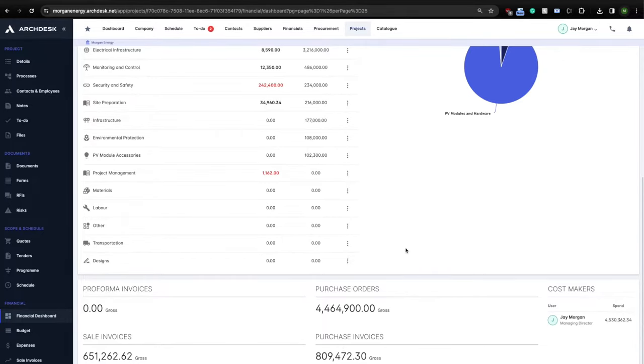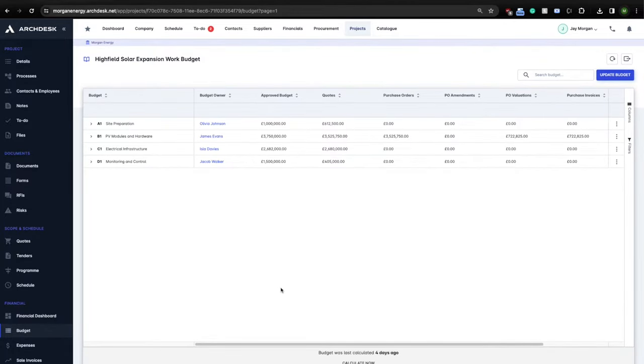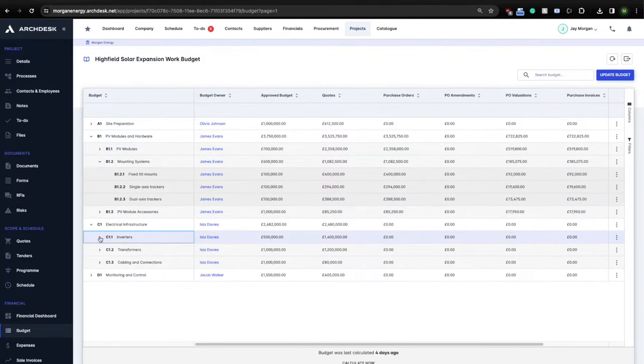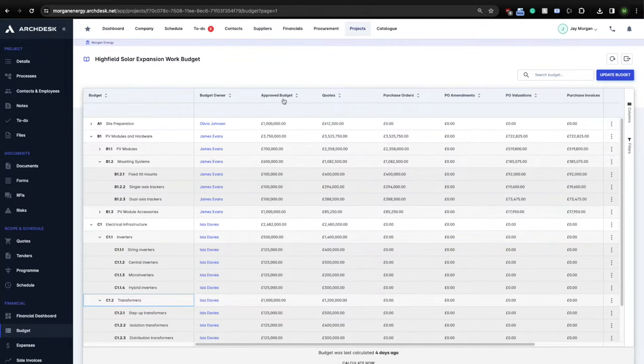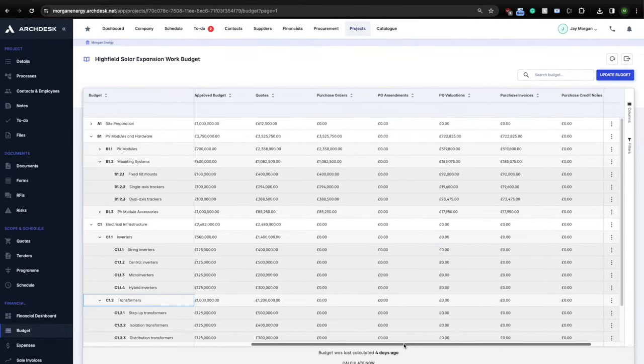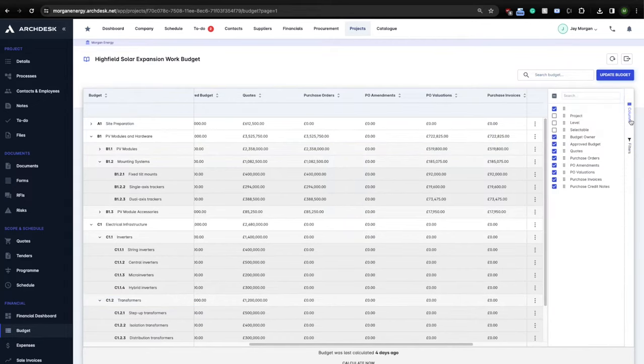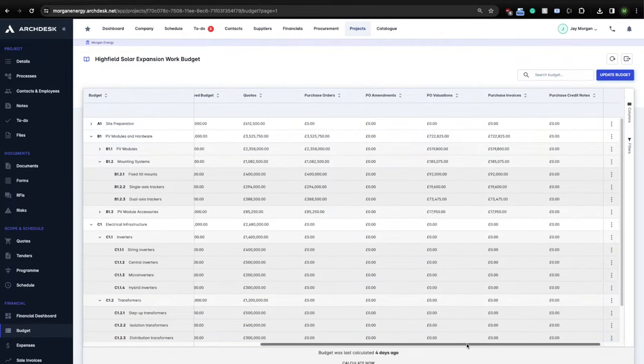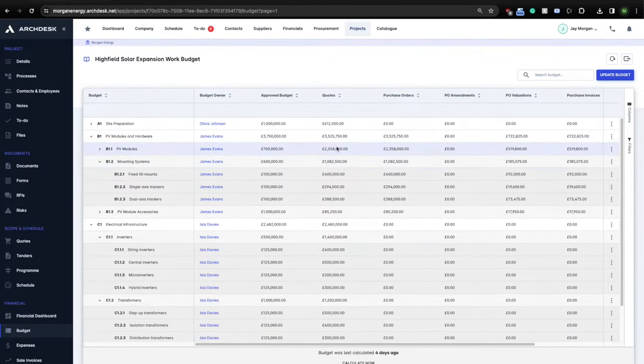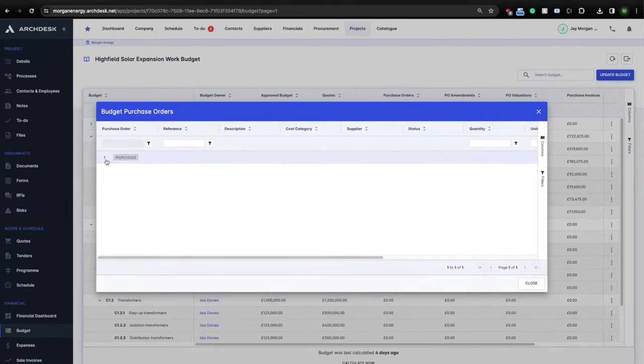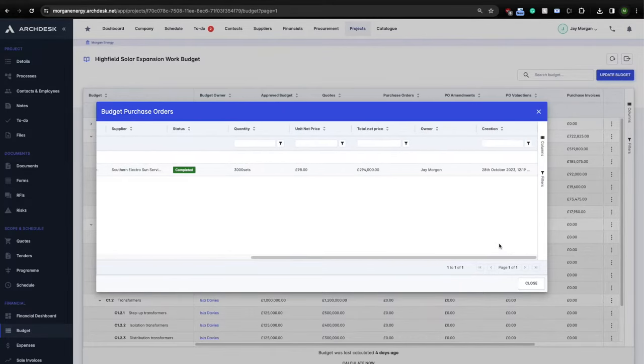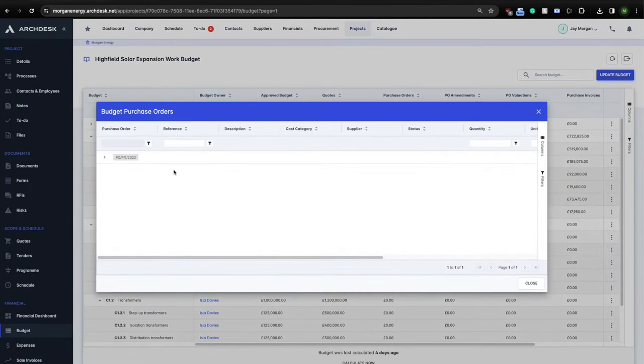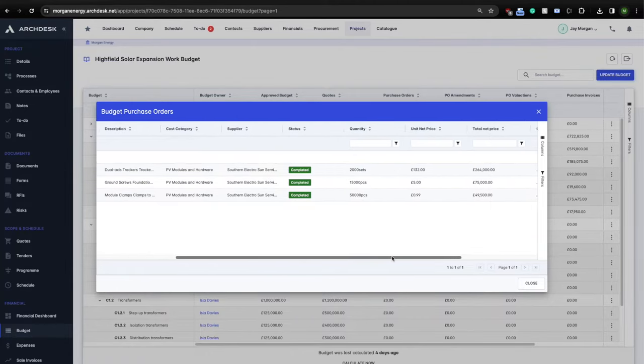In ArcDesk, you can optionally run a much more complex and detailed cost-controlling system using a budget or sometimes known as a cost-coding structure. Here you can define any cost-coding system of any depth and complexity you desire. ArcDesk can report in real-time all financial metrics against any of your cost codes, like approved budgets, estimated values, purchase orders, suppliers' valuations, invoices, variations to the work, and much more. You can manage detailed and high-level forecasting. You can even add your own columns and define a set of complex mathematical calculations needed on your project to deliver full financial compliance. ArcDesk can provide full financial transparency to your organization. It has proven to work on some of the most notable and largest CAPEX projects around the world.